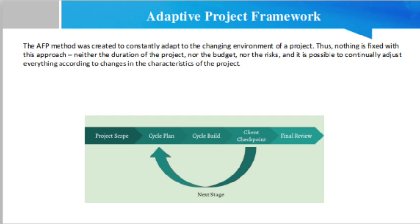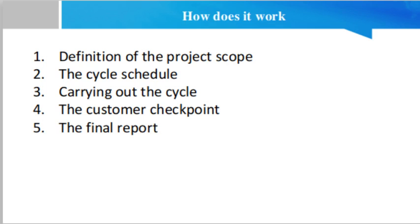So now the question is, how does it actually work? The Adaptive Project Framework methodology consists of five basic steps. The first step is the definition of the project scope. To begin with, it is essential to define what will satisfy the customer - in other words, what is the objective of the project, what are the customer's needs to be met.